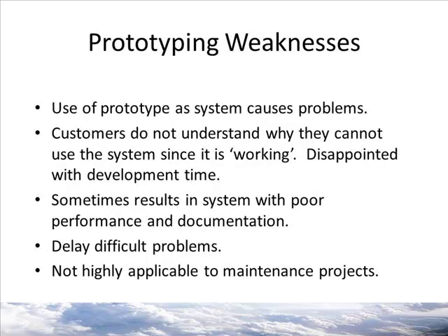Weaknesses of prototyping include use of the prototype as the system. Sometimes when something's built or halfway built, people will decide to put it into production, and often it's got serious problems with the logic or the functionality behind the user interface. Often customers don't understand that the prototype is the front end. It's not really a working system. And when you say, okay, thanks for the requirements, now we're going to go back and it's going to be 6 months before you can use it, they're a little disappointed, and they'll say things like, why can't we just use that? Because they don't understand it's not a fully developed system yet.